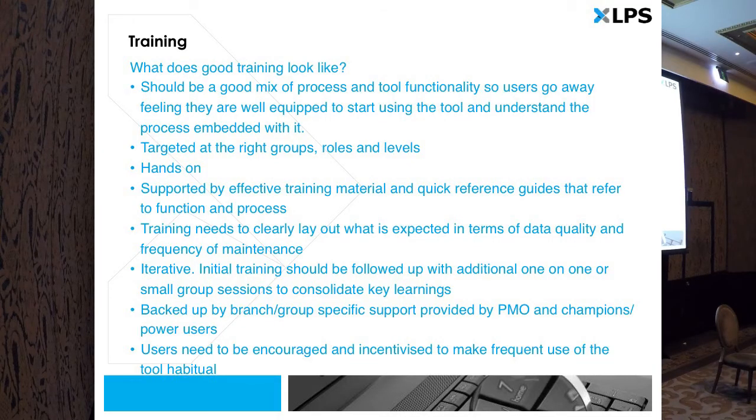What is the reporting rhythm? What is the level of granularity in the schedule? How do they request a generic resource as opposed to a named individual? And that's why the process side and the functional side need to be integrated as a whole when you're implementing a tool like this to provide, I think, the best possible outcome. And just the rest of the points are pretty standard. If you've done training before, if you have a training background, most of the stuff is applicable for any kind of training, not just obviously training in this particular area.